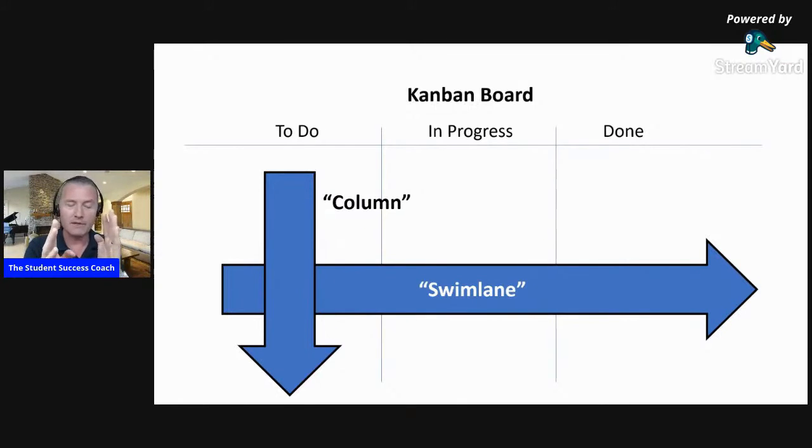So Kenneth, as I said to you, let's say the night before, you look at your to-do list, you calibrate how much you think you can get done in the day. You think about the next day and what other commitments you have to do. Move those stickies into that in progress column, burn your boats by committing to get them done. And then that day, your mission is to get those tasks done and moved into that column and completed and celebrated, hopefully with us in the members only Facebook group, so that you then clear that in progress column.